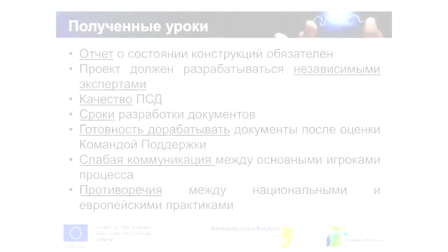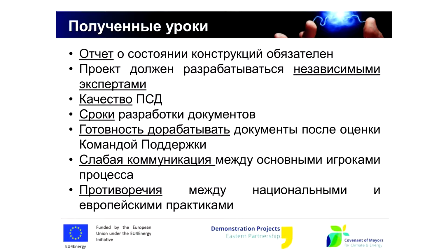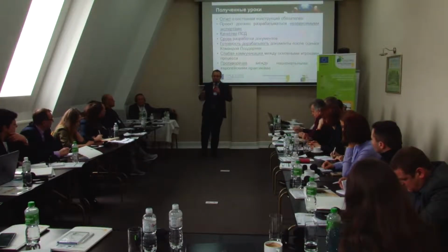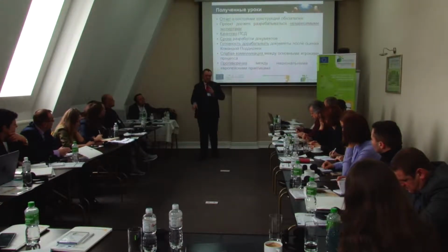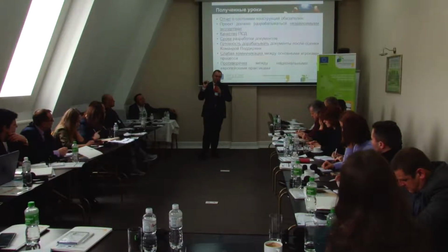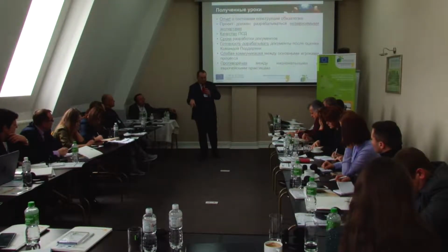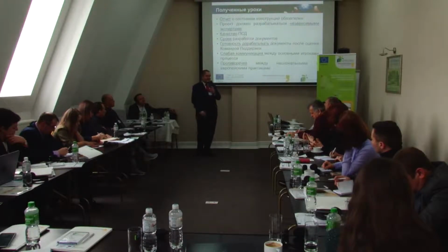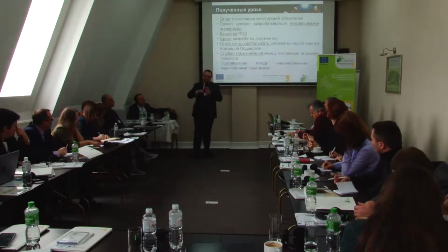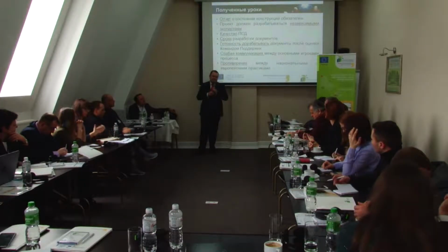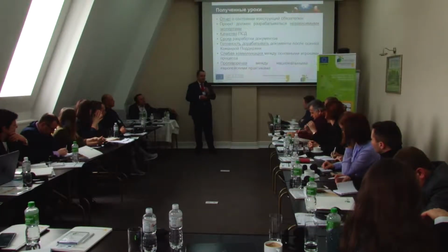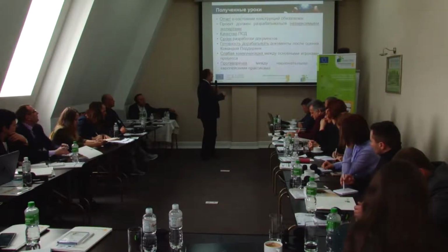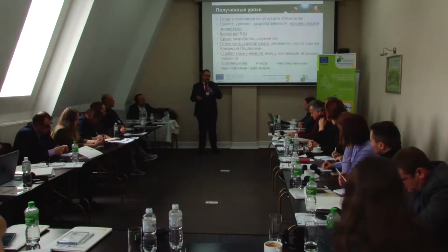We have also noticed an important point. This is communication between the key stakeholders of the process. At this stage, try already to attract the administration of the buildings you work on, or utility enterprises that will be responsible for technical maintenance of the facility, if we are talking about street lighting or heat supply or water supply, because these companies or people know such details which are not known to any external people. They know the system from inside, and they really come to help and notice the details not noticed by you.